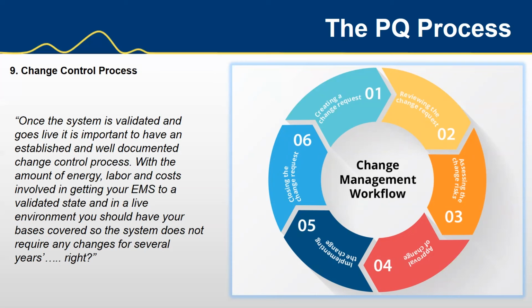You should manage any changes through an internal risk assessment. Are these changes necessary? What will the impact be, and what level of revalidation do we require? If I make this small change, what's the advantage? Because I'm going to have to potentially revalidate the whole system for this little change. Is it worth it? You need to be able to make that call.